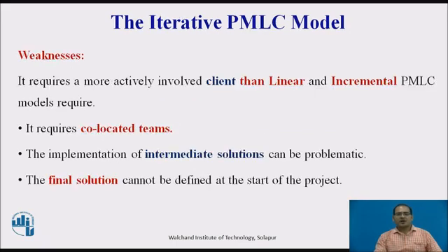Next, we will see the weaknesses. It requires a more actively involved client team than the traditional project management team. The higher the likelihood of change, the more you need active client involvement to make a good business decision regarding the change. It requires a co-located team. Having a co-located team is usually not possible, and this places a high-change project at great risk.